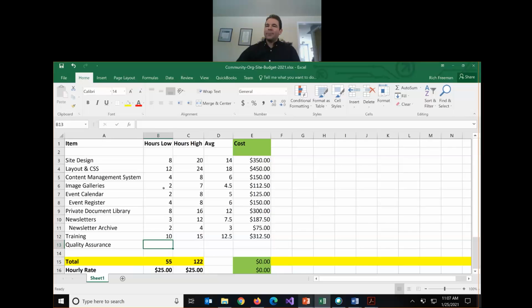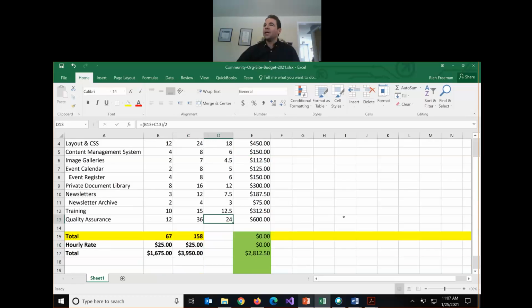Yeah, often I take a percentage. Often it's 15 to 20% of the overall design and development time. So Maria's going to say, let's put that in as maybe on the low end 12. You said on the high end, right? So let's add that to the budget, right?